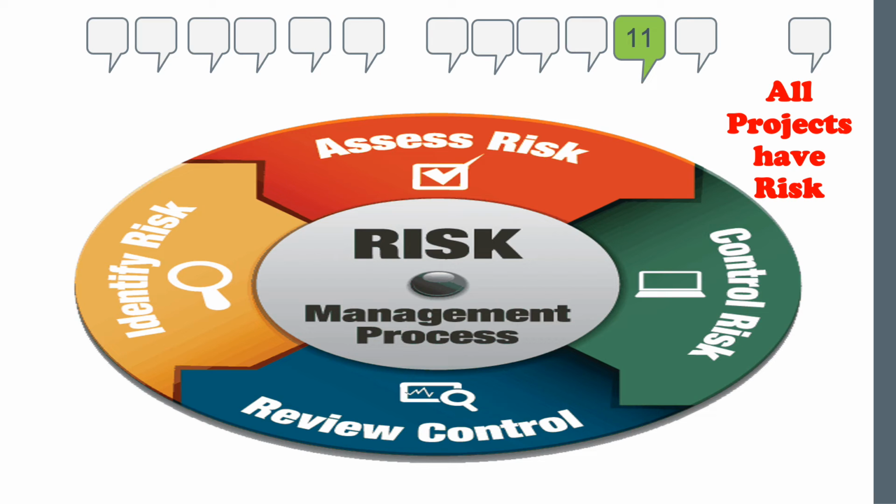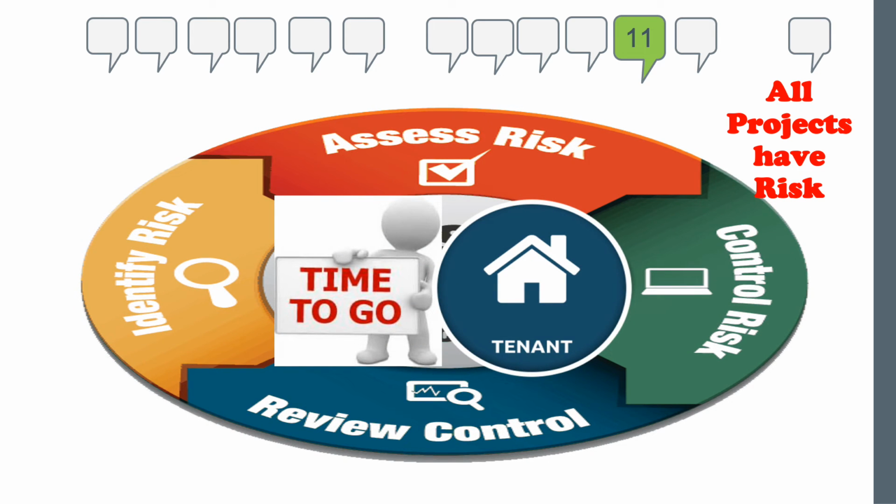Now in this particular case of this project, we've identified some very key risks. Number one is it's time to go. We've moved into a new building, but there's a tenant in there right now. I'm a little reluctant to move as it stands right now. We have some plans of how we're going to do that, some incentives, but we must be cognizant that for every day that tenant doesn't move by the time it's specified they should have moved, the project could possibly be delayed by that same day. If that adds up to a week, we end up paying $5,000 as a penalty. So that's a big risk. We have a plan for that.